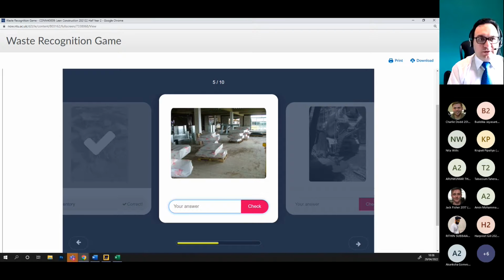Yeah, in many cases we confuse motion with transportation. Motion is about motion of people and equipment, small movement. Large movement, yeah, so carrying things is transportation. Carrying the windows from the ground floor up to the further floors, that wouldn't be classed as motion, would that be transport then? Because it's larger. Yeah. A small movement we call motion. But when you carry something from one place to another, lift it up, then it would be transportation. So let's say it is transportation.